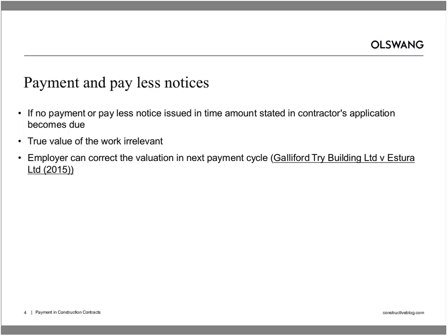I suppose it is true that fraud unravels everything, and so if you were in a position to be able to establish that a contractor has issued a fraudulent payment application, then it may well be that you could raise a challenge on that basis. But I would suggest that that's a much more difficult way of going about things. It is much easier to serve the notice than to try and argue that a fraud has taken place, with the very high bar associated with establishing that.